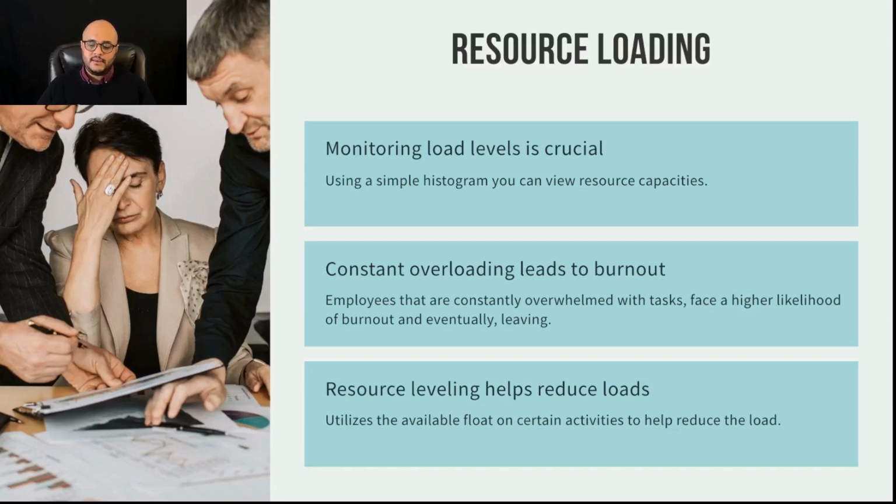And we can absorb some of that float on activity A. We can say, okay, no problem. We'll prolong activity A for 2 or 3 more days to give Mike a bit of a break, to bring his days back to normal working hours. And we'll absorb that float. That's called resource leveling, using up the float to help reduce load.